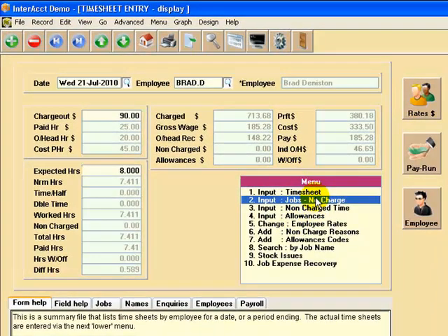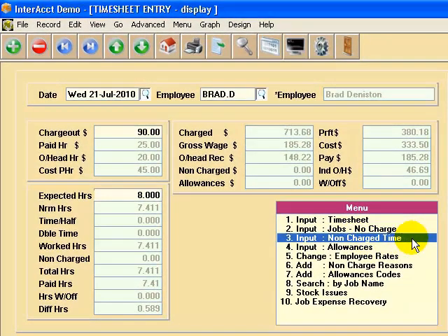So at the payroll summary menu, you can also enter not only chargeable time, which we did under menu 1, but also non-chargeable time against jobs, which might be when you're preparing tenders and quotations, doing estimating. You may want to record what hours have been spent that aren't able to be recovered. And in addition to that, you can have non-chargeable time that is not related to jobs, such as repairs and maintenance work that's been undertaken, or cleaning tasks, filling in timesheets, which is admin time. So you can analyse that against the employee to see analysis by month of what time was charged, non-charged, hours written off, which is one of the options in this case, and also non-charged time analysis of if they weren't working and charging their time to jobs, what were they doing.